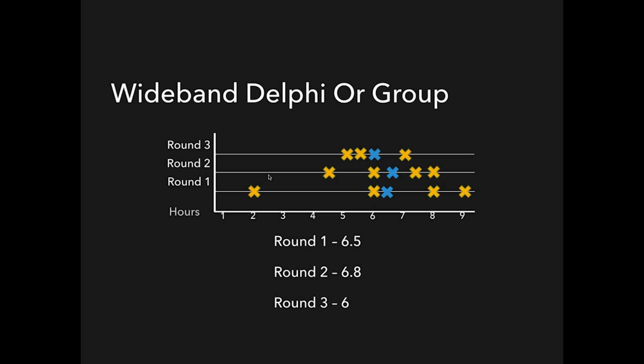You can come back and go, it still doesn't seem right. And you do it again until you get down, and everyone who votes gets to decide whether or not the number is correct. And this is really based on the law of large numbers. So what you do is you're trying to get a lot of numbers in there to get your aggregate or your average in the center, and then everyone votes on it, and this is the number you're coming up with.